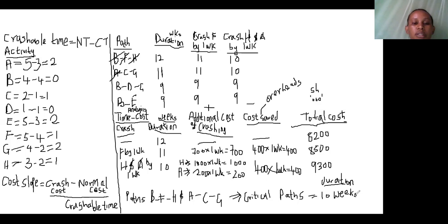Once our process of crashing is over, you move to the stage of doing the time cost analysis, and the last thing that you should have is to consider revising your network diagram. So that is the exercise for today. You remember to network again. After you have considered the activities which have been crashed, make sure you indicate the remaining amount of time.